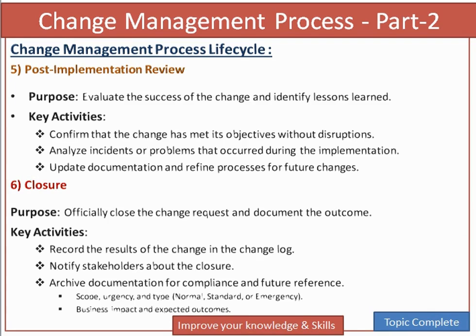The fifth point is post implementation review. Purpose: evaluate the success of the change and identify lesson learned. Key activities: confirm that the change has met its objective without disruption, analyze incident or problem that occurred during the implementation, update documentation, and refine process for the future changes.